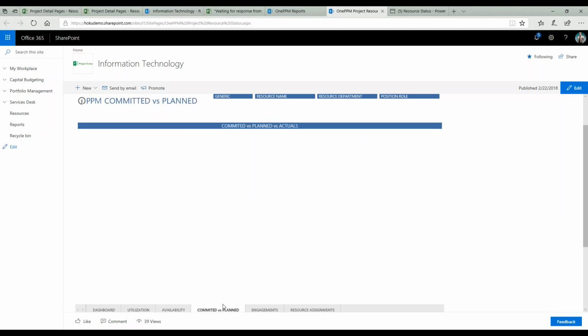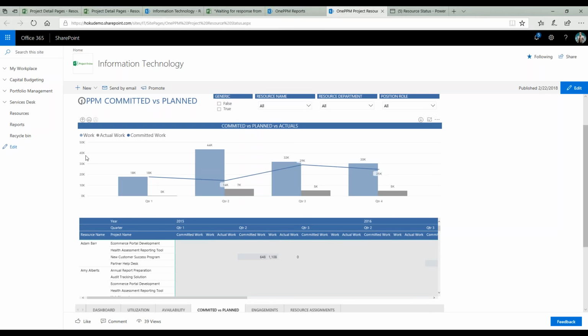And then even looking at the multiple dimensions. We have our capacity planning that's done in OnePlan that actually can give us an idea on this line of what we thought we were going to do from a high-level capacity plan, but then ultimately compare it to what's being allocated in detailed tasks in resource assignments versus in the gray what comes across in the timesheets or what we actually spent time on.